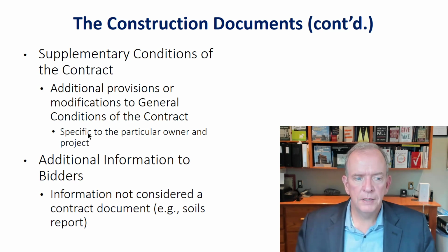Additional information to bidders, information not considered a contract document. So it's like a soils report. These are information that's being provided to you to be aware of. And so in your pricing of the project, you should be utilizing this information.